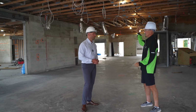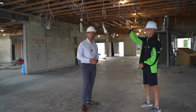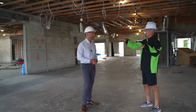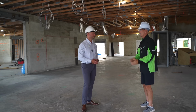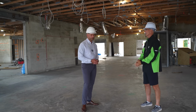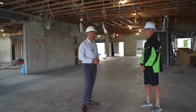I think they're complete on the north and west side. They're still working on the south and east side. Again, wherever a new roof is coming in, touching an old roof, they basically cleared off all areas in the same plane. So the valleys and hips will all go in clean. So again, generating a lot of waste. So dumpsters have been going out, tons of material, and that's all good. A lot of construction traffic in and out recently.